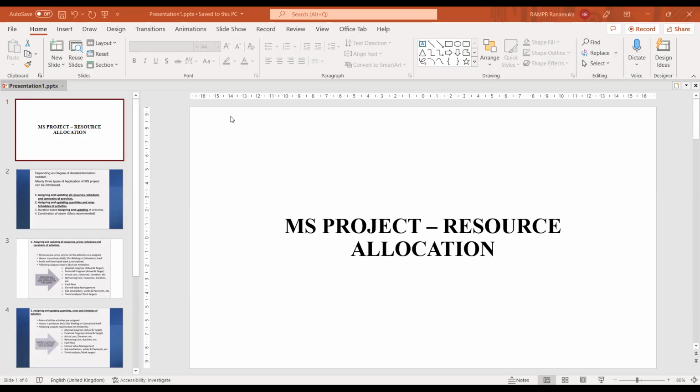When we are preparing the program, we have to consider that it should tally with the BOQ. For that, you have to identify the elements, take the quantities and get the BOQ. Based on the BOQ, we can go for the program. Today I'll tell you the observations I made on the students' last submissions. So directly we can move to the MS Project sessions.